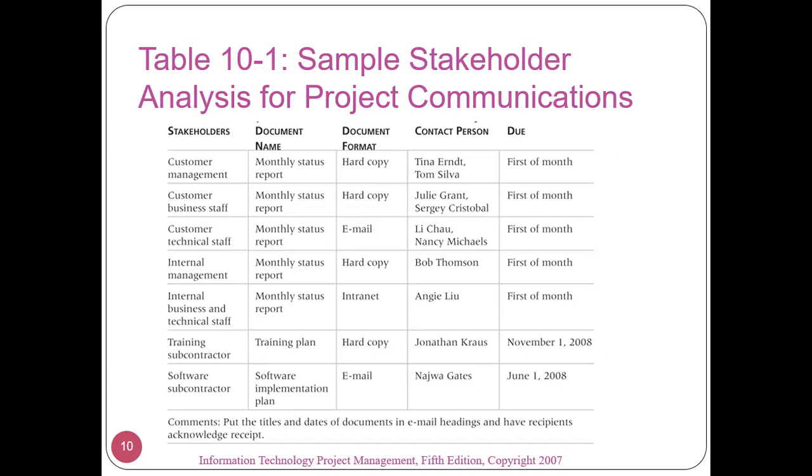You can create a similar table to show which stakeholders should attend which project meetings, and it is always a good idea to include comment sections with this type of table to record special considerations or details related to each stakeholder, such as documents, meetings, and so on. Having stakeholders review and approve all stakeholder communication analyses will ensure that the information is correct and useful.